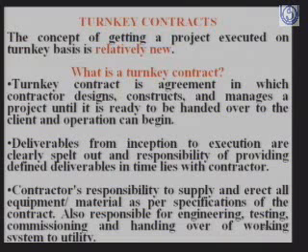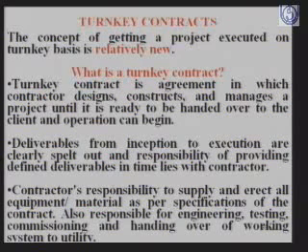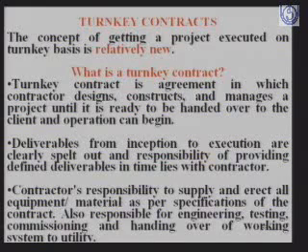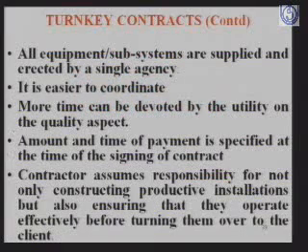So it means the entire responsibility of executing the project, starting from design to construction, doing the project management, is his, and he hands over to the client to take up operation immediately afterwards. Here all equipment and subsystems are supplied and erected by a single agency. Single agency is the turnkey contractor. It is easier to coordinate. If something is wrong, I can go to that agency and ask, why is this project not getting completed in time?